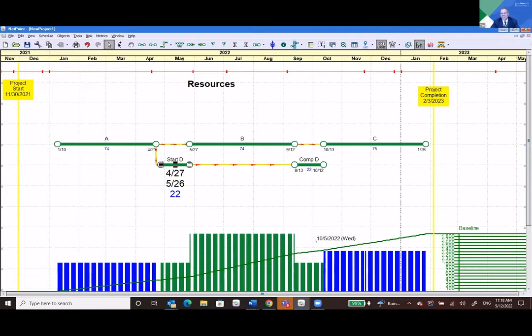I've seen all those examples in my scheduling work. So I think some of the key benefits you'll see here are that in NetPoint, you are in control of where you put activities on the canvas. In a regular CPM tool from the 1950s, you would be stuck with either constraining this to this date, or it's going to slide all the way back to its earlier date. So that's one of the cool things. We put the planners in charge, and they get to decide where they want their activities to be placed.